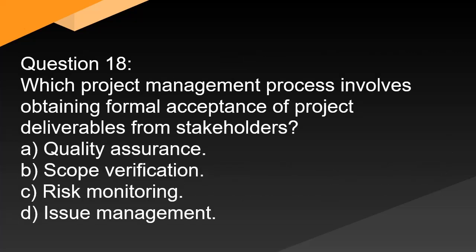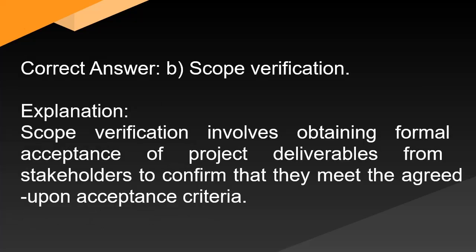Question 18: Which project management process involves obtaining formal acceptance of project deliverables from stakeholders? A. Quality assurance. B. Scope verification. C. Risk monitoring. D. Issue management. Correct answer: B. Scope verification. Explanation: Scope verification involves obtaining formal acceptance of project deliverables from stakeholders to confirm that they meet the agreed-upon acceptance criteria.